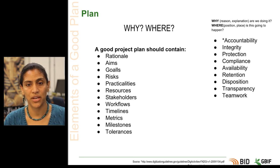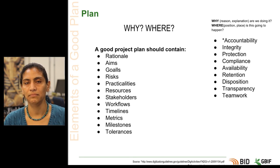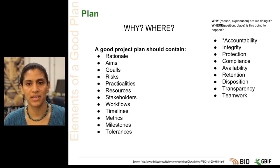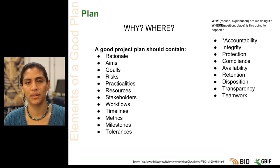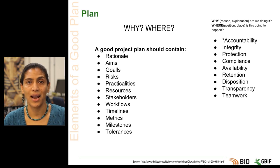It documents retention, i.e. how long the data created by this project will remain fresh and what needs to happen to keep it that way. Your project plan will document disposition — what is the ownership of the data created by the project and who will be responsible for it at the end of the project and afterwards? Good documentation encourages transparency. Openly sharing practical project plans feeds back into the community and allows others to share in your successes and learn from your failures.